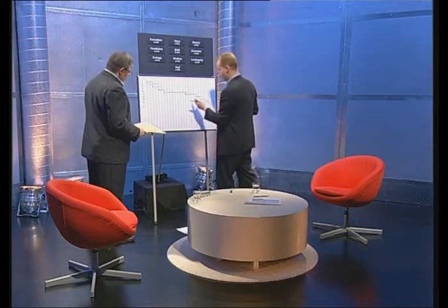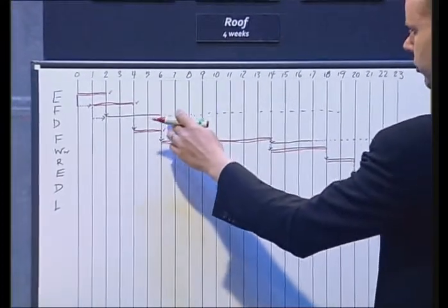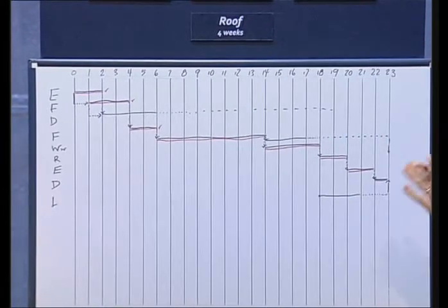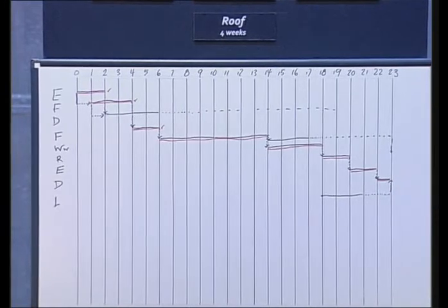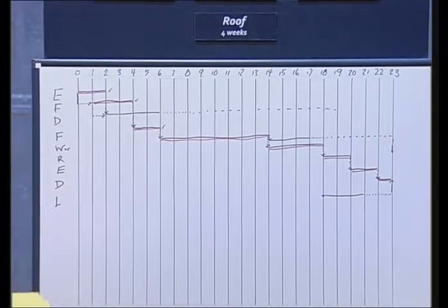Okay. As you can see, the drainage and the landscaping and the windows all have what's called free float. So you cannot have any float on your critical path activities. Right. And in terms then of contingency building in, because these are very clearly start-finish dates, but presumably, since we started talking about it being guesstimates, presumably you have to build in some contingency network here as well.